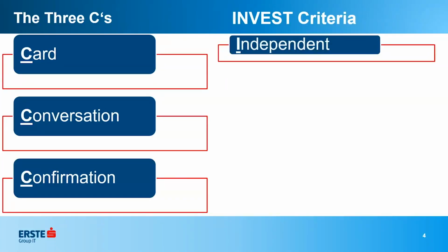So we all know stories should be independent. When you're writing a story, if you're seeing dependencies, you should do whatever you can to remove those dependencies, if at all possible. Of course, I live in the same real world you guys do, so I know that's not always possible, but every effort should be made to have the stories independent. If it's not possible, or if it's going to be so time consuming to remove the dependency, just make sure the entire team is aware of it and put it in Jira so that anyone else looking at your stories also knows you are aware of that dependency.